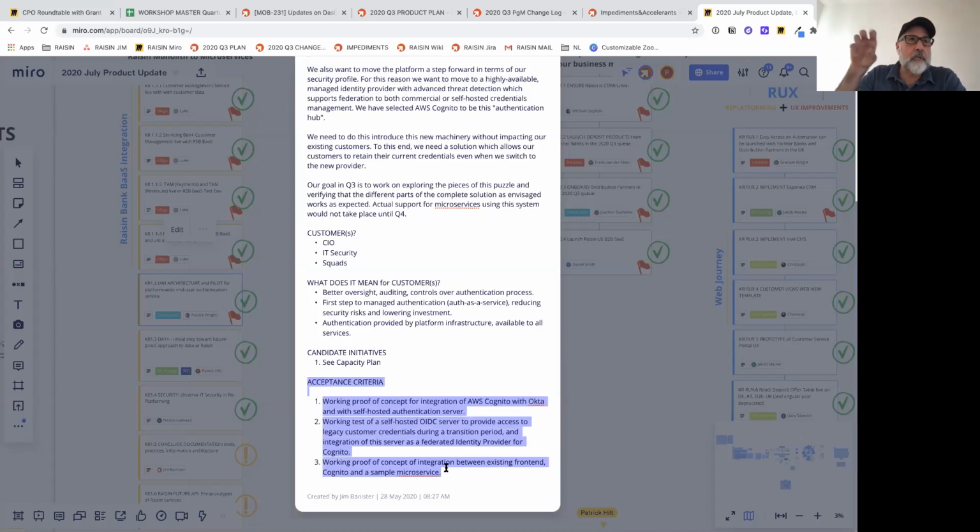there's also job stories inside the actual epics. But at the OKR level, there's an acceptance criteria that says this is the outcome that we agree with the business is what we're seeking. And then we go and we implement the initiatives that support that OKR and the epics that support the initiatives, and that's how it goes. Does that answer the question? Ish? I believe so, yeah.